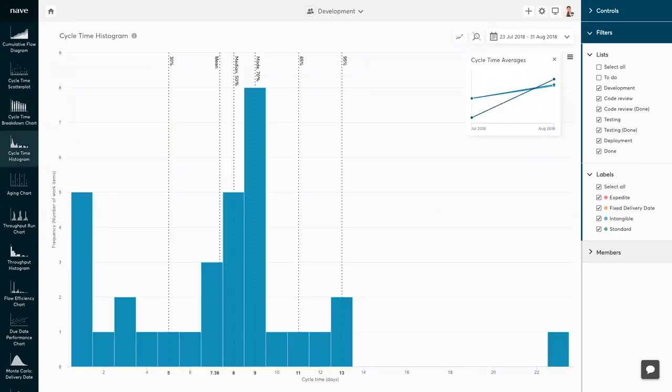The cycle time histogram shows the frequency distribution of completion times of tasks in your workflow. By analyzing the distribution of your cycle times, you can determine whether there is too much variability in your process — a wide spread indicates your cycle times vary significantly and your workflow is inconsistent. Average cycle time is a measure of performance. In this chart we show the mean, median, and mode average cycle times and how the trends build over time. Ideally the lines should be close to each other, stay even, or go down. If values are going up, you may need to reevaluate your WIP limits or alter your process policies in order to establish a faster delivery workflow.